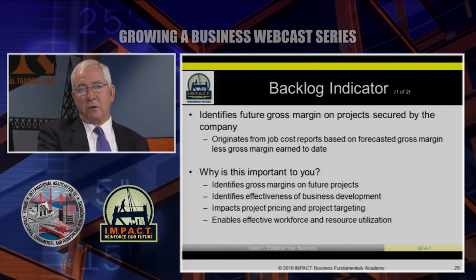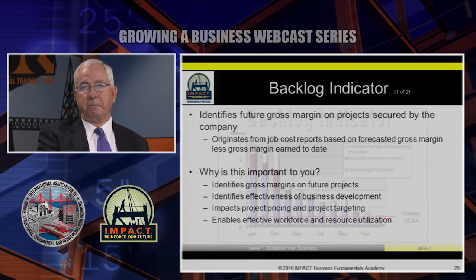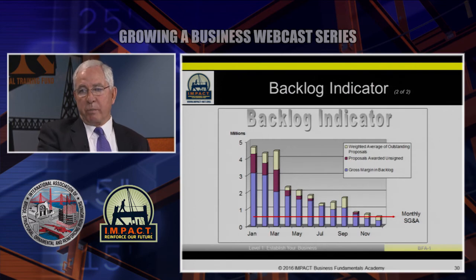The best contractors never ever take work that they don't have a seasoned project manager for or a superintendent to run the job. And so taking jobs that you can't staff is one of those causes for the bad jobs we talked about earlier. And here's the backlog indicator.